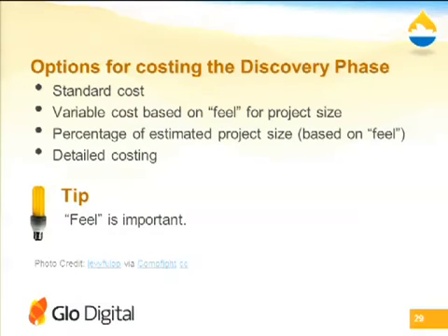Often, in the first couple of minutes of talking to a client, you will get a feel for how big a project is. You could actually present a price with conditions, saying for a typical project that is going to take 120 hours or something to work on, we charge this much. If it turns out to be more than this, we'll charge this much more for the extra. Pretty easy. Now, I wanted to talk about feel.